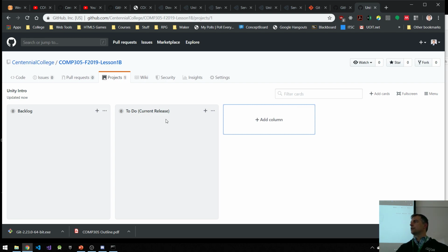The first release for you guys is going to be the first playable, right? So imagine if I have my backlog, but only for the first playable release, I want to pass in some items that I want to put on the backlog over here. So I'm going to put them inside this to-do column. So imagine now you're a software engineer and you want to pull one of these features and work on it.